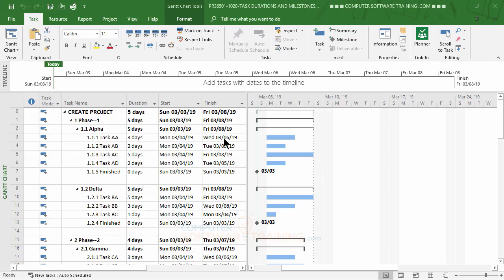that when this particular task ends, we want this next task to start. And when that one ends, we want the next one to start. This relationship is called a finish to start relationship, in that when one task finishes, the next one starts. All right. So we're going to put those in first for each of the groups, and then we're going to go back in there and start relating some of the groups with one another. That'll be kind of interesting.